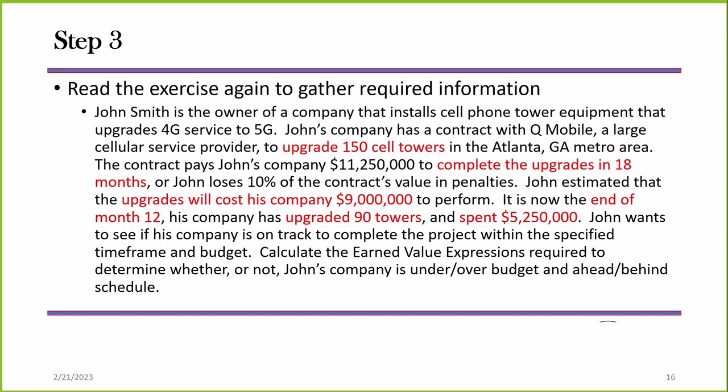But that's not a factor of earned value. Earned value is based on the premise that for every dollar I invest in a project, I get a dollar's worth of return. That is our expectation. If I buy 1,000 feet of film at $10,000, I'm getting $10,000 worth of value. So that is the premise on which earned value is based.